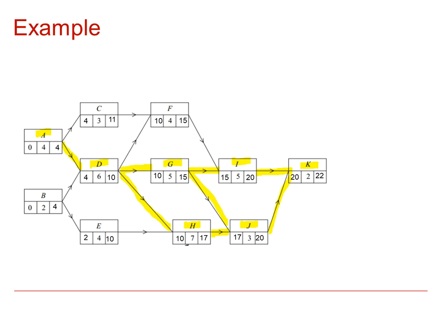So we would say that the critical paths are A, D, G, I, K. Then I would tend to list them separately, I think: A, D, H, J, K, and A, D, G, J, K. If you wish, you could just do it as a branching diagram, but probably better to list all three different paths.